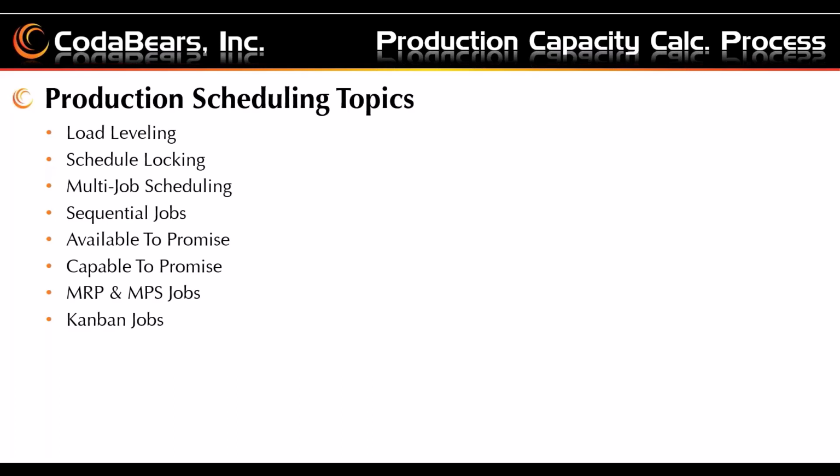Jackie's got a question here. If we have to purchase material to the job, does the scheduling engine take into account the promise date from the PO? Nope. The promise date on the PO is when the vendor is going to promise you have it. That's not necessarily the date that the job operation is supposed to start that material is linked to. If you have a discrepancy where the supplier can't get the parts to you when that operation's needed to start, we need to let production know so they can reschedule because you just can't get that material in time.